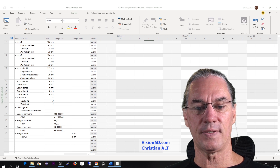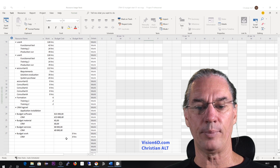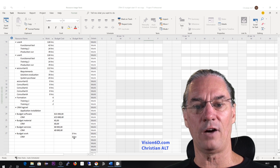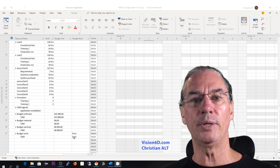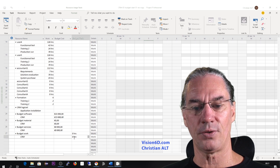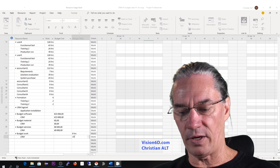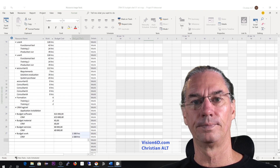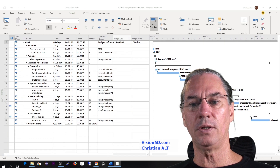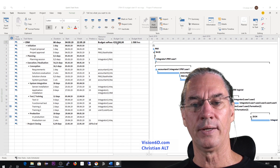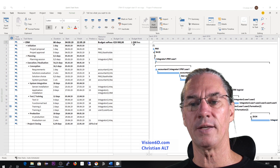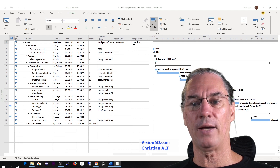Since it's a budget resource, the only task it has is CRM. And you see that instead of showing up in the cost column, it shows in the work column as a quantity of hours. If you remember, in the beginning we said this project is a 1,500-hour project. So I will simply key in 1,500 hours. Going back to the Gantt chart, we now have the definition: a cost budget of 23,000 euros and a budget work of 1,500 hours.